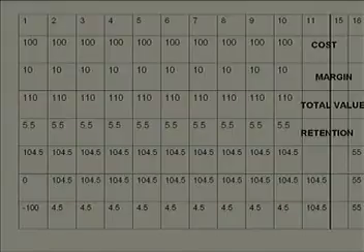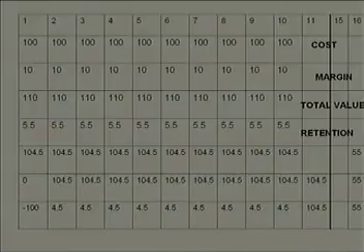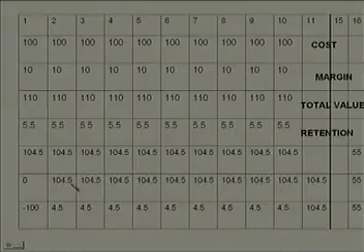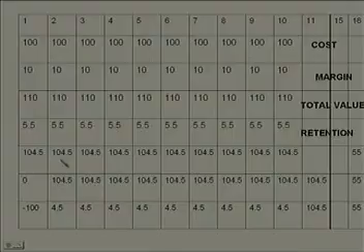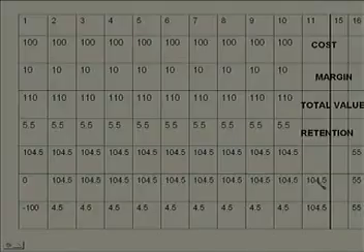Now, you must have recorded one more information which I gave you before starting this table. I had said that client delays the payment by 1 month. So, that means the payment which I was supposed to receive in month 1, I am receiving it in month 2. So, you will find there is a shift of 1 month. So, the first month's bill I am getting in month 2, second month bill I am getting in month 3, third month bill I am getting in month 4. So, month 10 bill I am getting it in month 11. So, you may find that there is a lateral shift of 1 month.